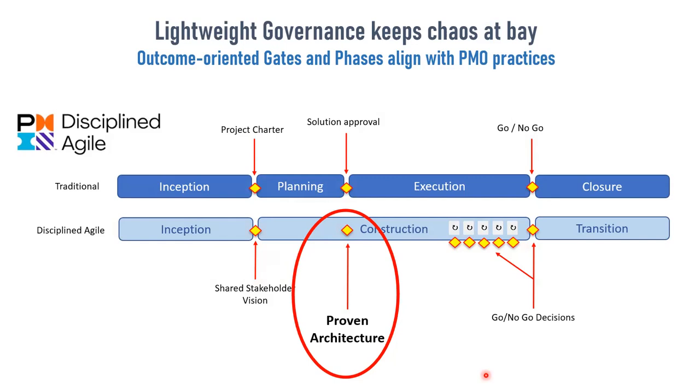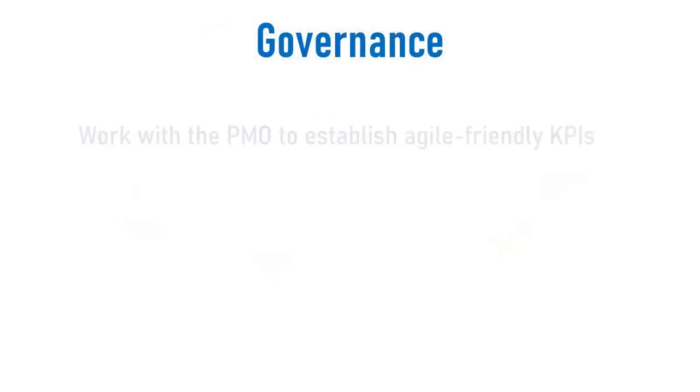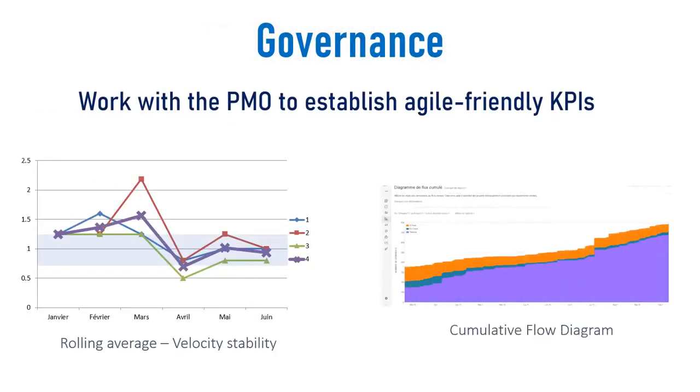It's basically, don't try to prove your architecture in Visio, prove it with code, even if it's just a bunch of DOS-type windows saying, ping, I am here, I have received your response, right? Just show that it can be built. So very important, proven architecture is basically a governance milestone. A couple more governance milestones along those lines.